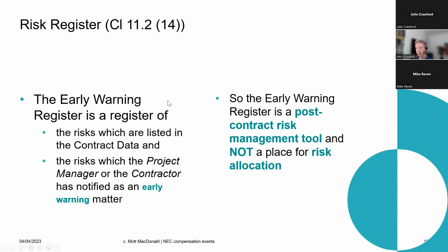And it's really important that there's nothing here about the contractor's tender document either. So whatever they write in their tender document also does not contractually allocate risk. The contractor often thinks it does, but it doesn't. Acceptance of the tender does not mean you accept any qualifications or limitations that they put in there. They have to make their way into the contract documents.